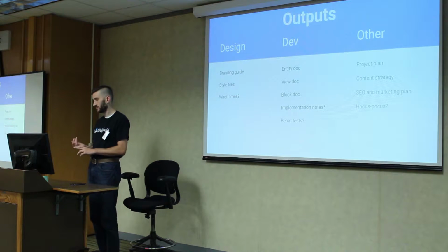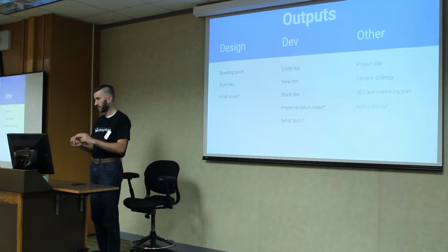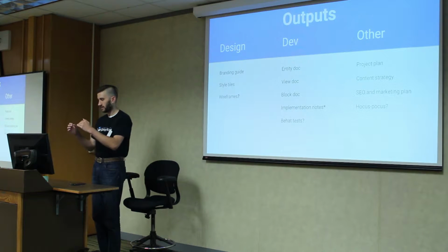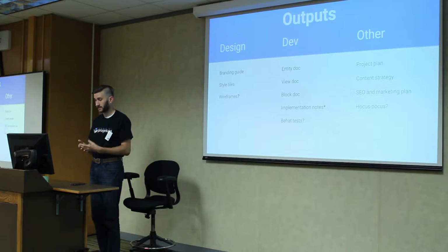You're saying who's doing something, where are they when they do it, what are they doing, and then the other parts are always less important. So you're writing out the actual thing that somebody would do on the website and what's expected to happen when they do that thing, and criteria for how that particular action can be accepted by the client at the end of the project.